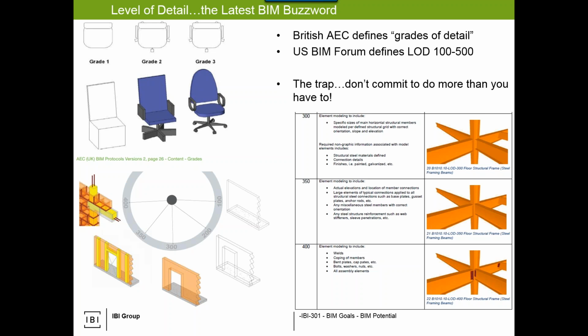There's nothing wrong. You have a model. It's just a little bit more. But the risk there: if something is fit for installation, so it's designed, it's detailed, connection details are in place, and it's been procured, and it's ready to be orientated in the building, in the facility, relative to the other installed components. That's beyond the designer. That's means and methods construction.